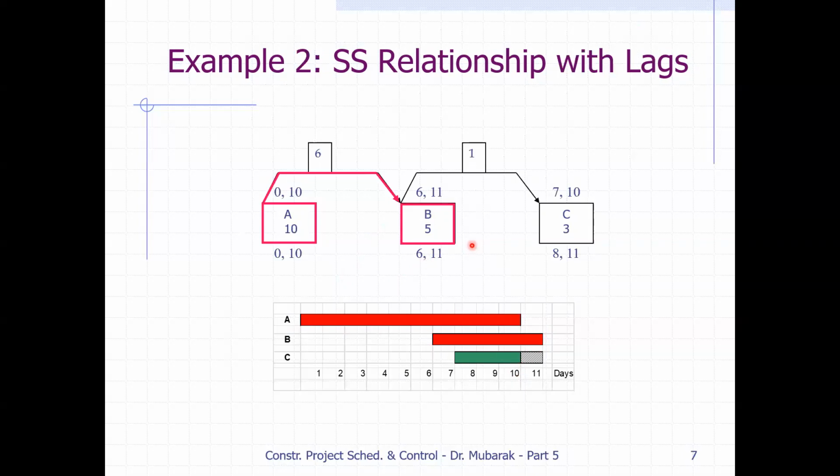So this is still unrealistic because you still need to give extra time for the pipe to be done. So we gave it here an 11 late finish, so it can finish at the same time, which is one day of float. But then this activity became non-critical, while in reality, it's actually critical, if that makes sense. So with that, we have to find another approach.